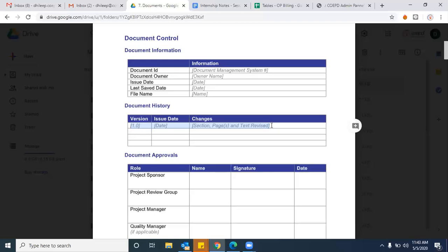revisions may happen. It is minimum I'm talking about. In few scenarios, couple of people are having even 10 plus revisions. But all revisions will happen to the first version only. Now all of a sudden the client wants, I want the inpatient module as well to be added to the existing scope. It is a big scope change, right or wrong? Yeah. That's 2.0. Then it will come under 2.0 because 1.0 has been handling only OP billing. If the complete scope has been revised and modified, then it will come into the second version of software.